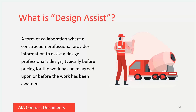The initial services the consultant is going to provide are design assist services. Design assist is a form of collaboration where a construction professional provides information to help the architect of record's design, typically before pricing for the work has been agreed on or before the work has been awarded. Because our project is very time-sensitive, having the consultant involved in the design from the outset can provide real tangible benefits, including cost-effective design solutions, reduced coordination conflicts once construction begins, fewer change orders, and a better chance of schedule adherence.